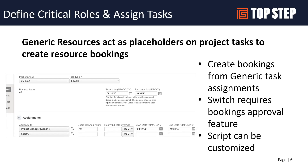What we're seeing a lot lately is the transition from generics on task assignments — how do we create bookings in a more automated fashion than manual? There are a few options: taking those proposed projects and generating a set of bookings from the project plans using dates, hours, and those generic resources. If you're using booking approvals, there's actually an automated out-of-the-box way to take a project plan and generate a set of bookings from generics on task assignments.